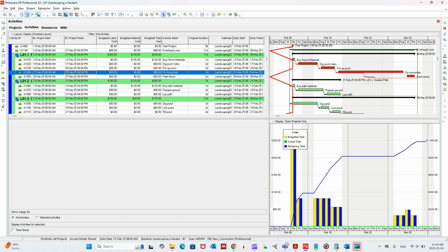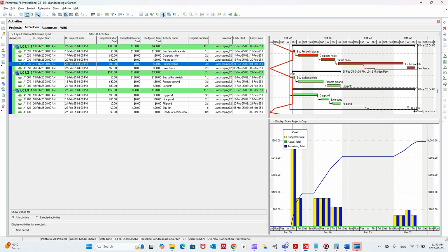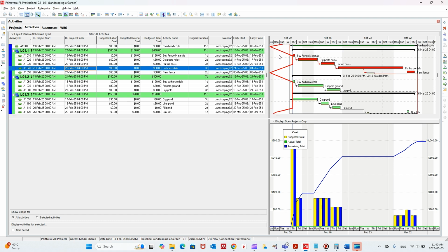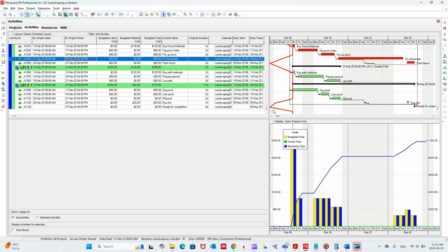When you see this, nothing happened here, nothing happened here, nothing happened here. But when you look at these two activities, they are all extended. So you're going to see that, right, it goes toward the left. Here, nothing has changed. The same, the same, the same. And then at the end, there are changes here. So it will go toward the left. So when you look here, you know that the activities are not as planned, and there are delays happening in the project, so you can locate them.